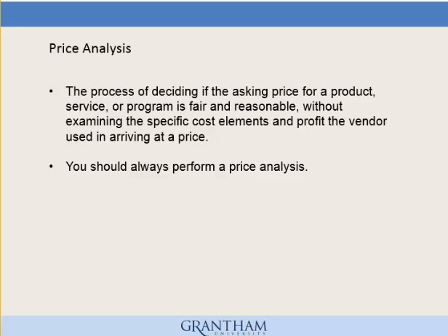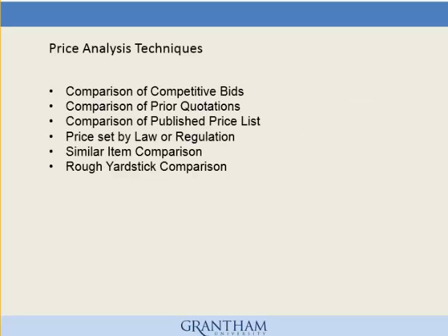Price analysis is defined as the process of deciding if the asking price for a product, service, or program is fair and reasonable, without examining the specific cost elements and profit the vendor used in arriving at the price. You should perform a price analysis on all contractor proposals. There are several techniques for performing a price analysis.